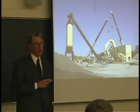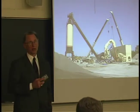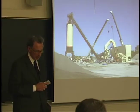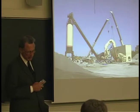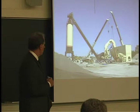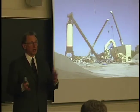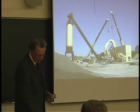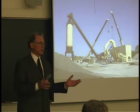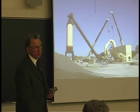The total quantity of asphalt that we had to get down in the 2-year contract was 550,000 tons of asphalt, 5,500 cubic yards of concrete, 160,000 cubic yards of borrowed dirt, which is dirt that has to be hauled in from another location, 90,000 tons of stone that went on shoulders and other parts of the project, and 200,000 pounds of rebar.